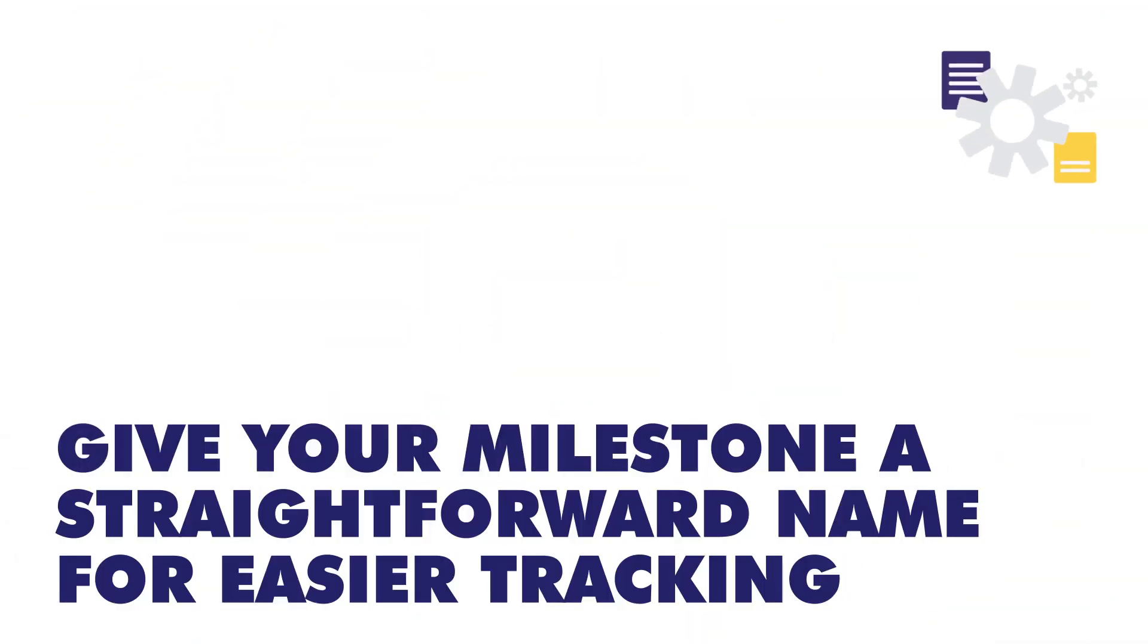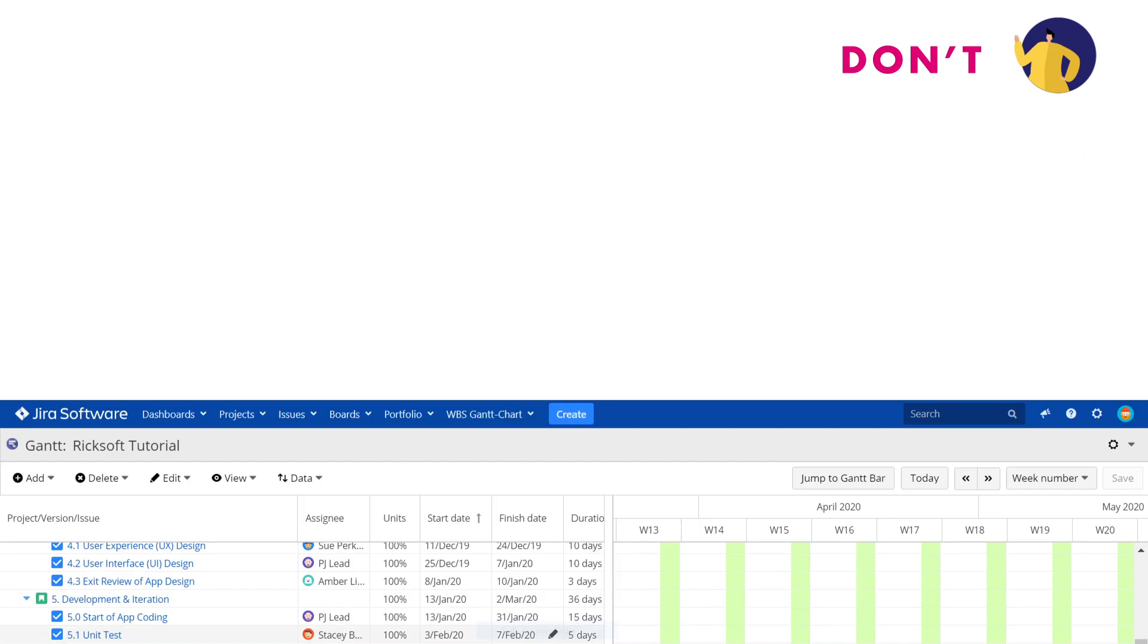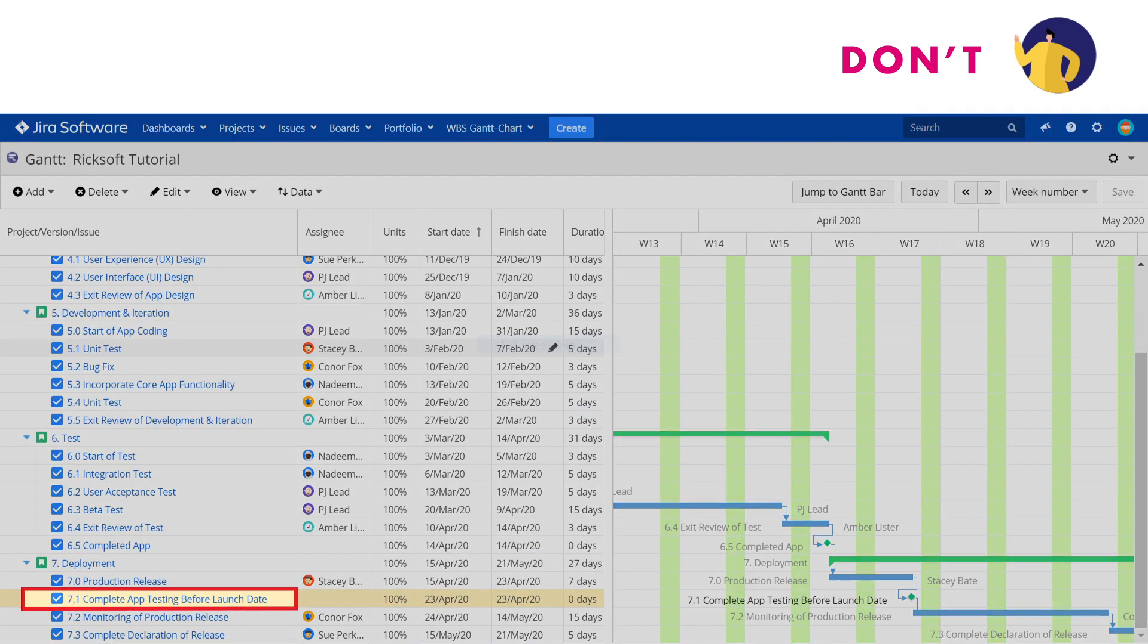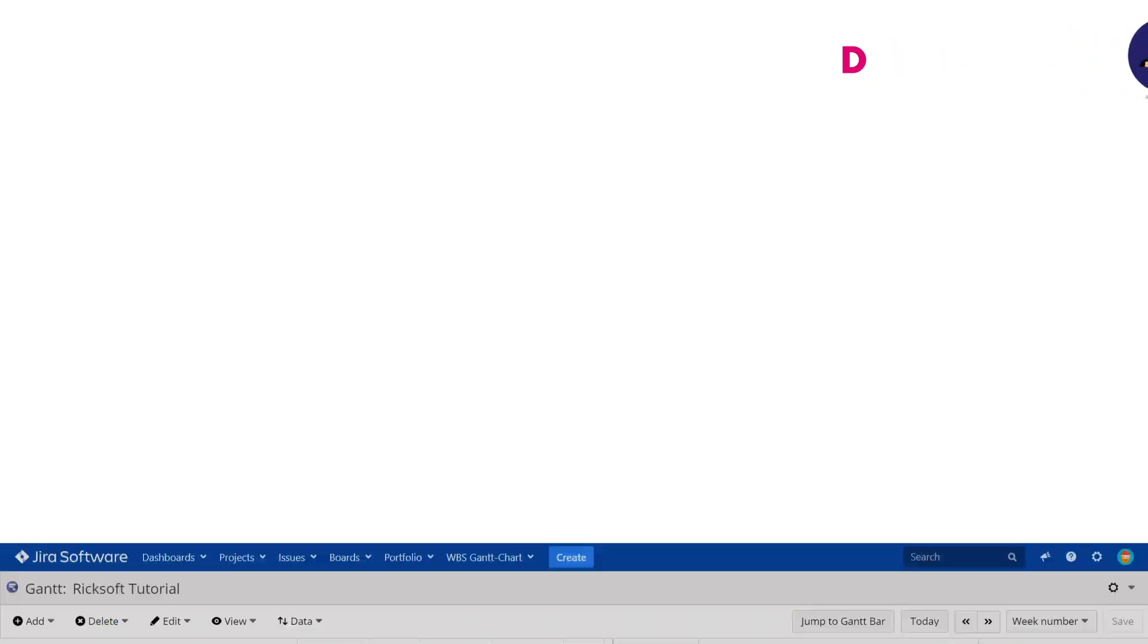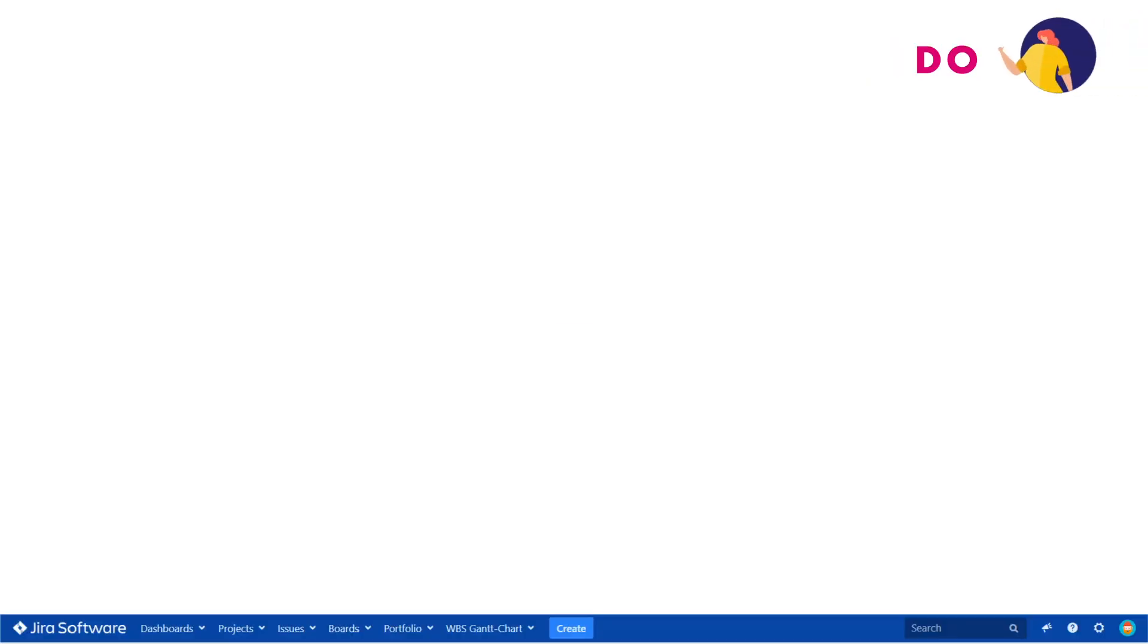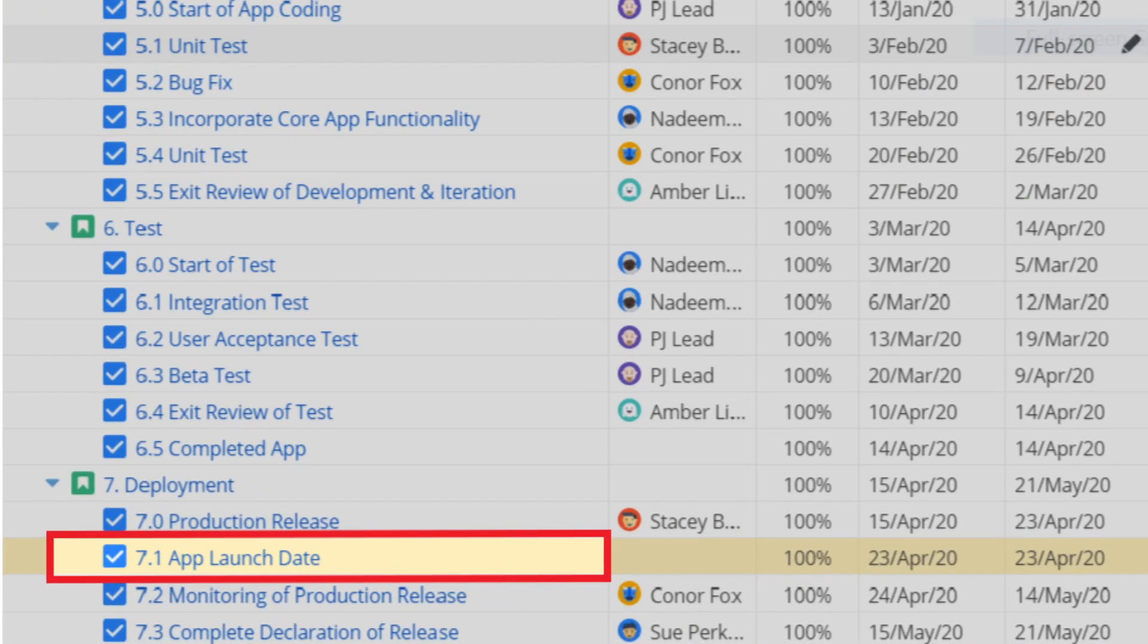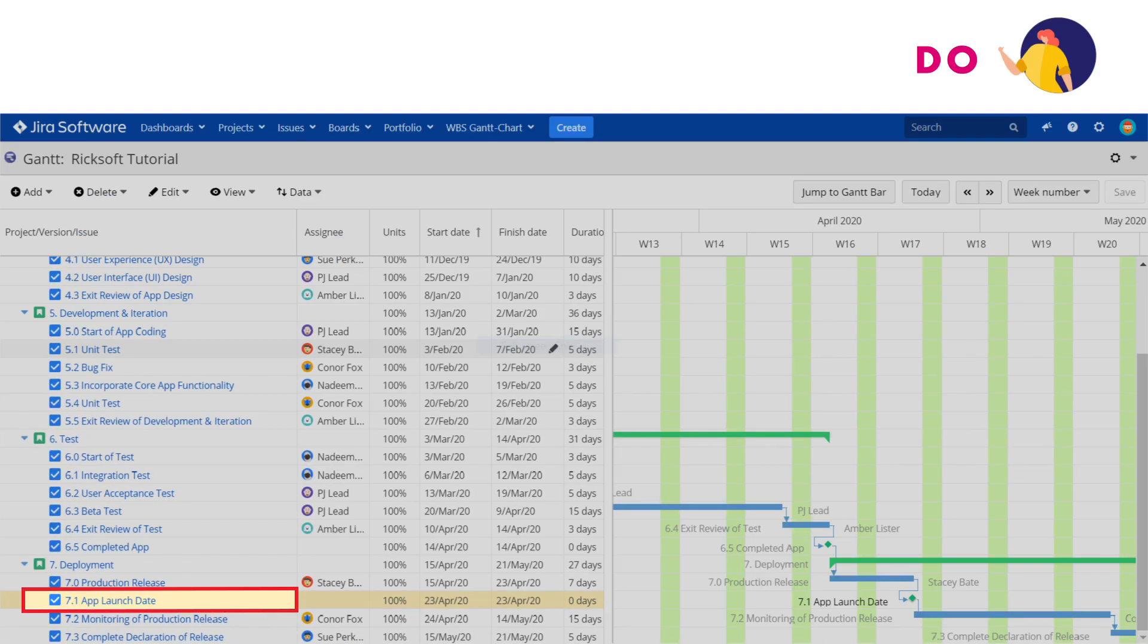First, give your milestones a straightforward name for easier tracking. The name should not explain the tasks involved to accomplish the milestones. In fact, the milestone should just indicate the outcome of the task completion.